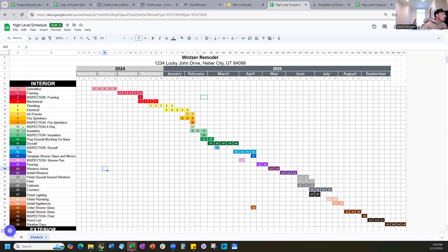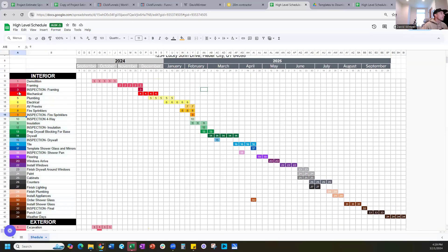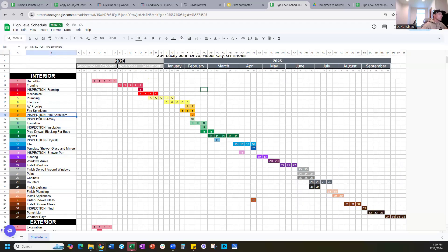One thing I like to do is make inspections a different color — like bright red — so you never use bright red anywhere else on the schedule. Then every time you see bright red you immediately know it's an inspection. I would definitely input all the inspections for your particular county or city to make sure they're all accounted for so you're tracking them on the right dates.